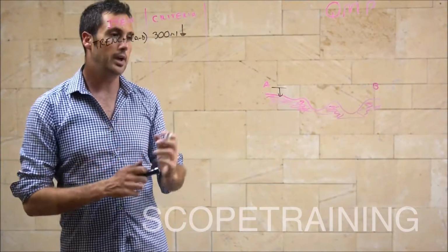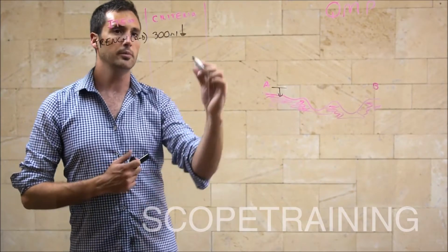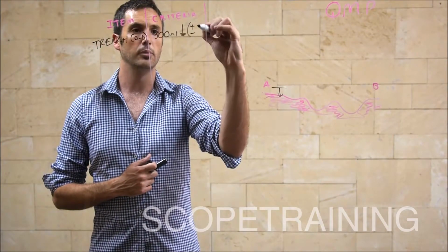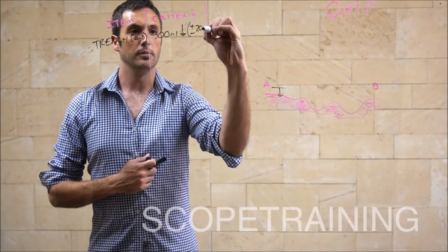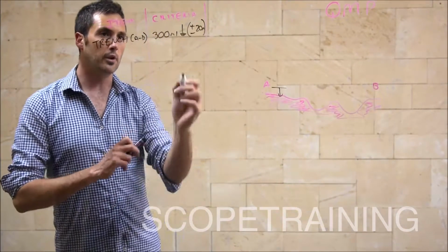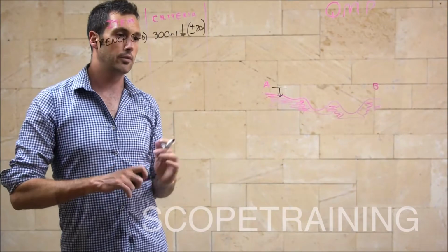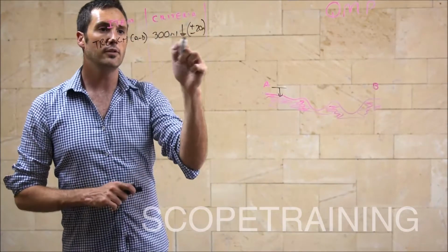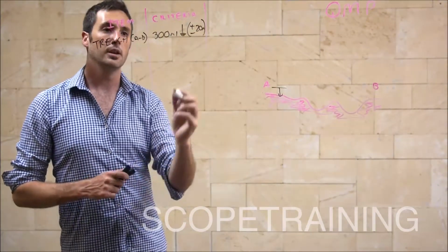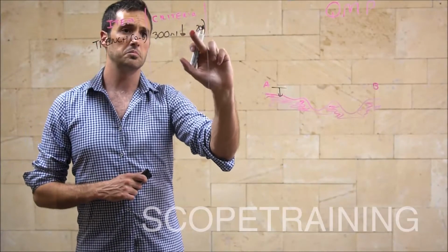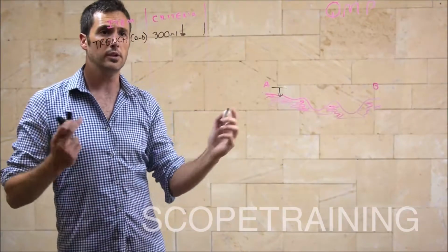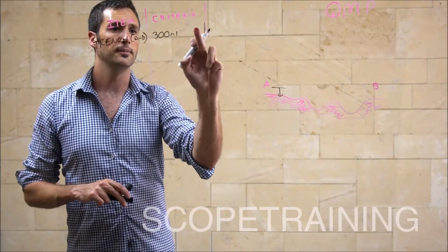If there's a capacity for a tolerance which is acceptable, put that in, plus or minus 20 mil. I do realise that this would actually make it non-conforming if that was the real standard, but make this fit what your intentions are. If there's no acceptable tolerance, that's it. It needs to be 300 mil exactly.